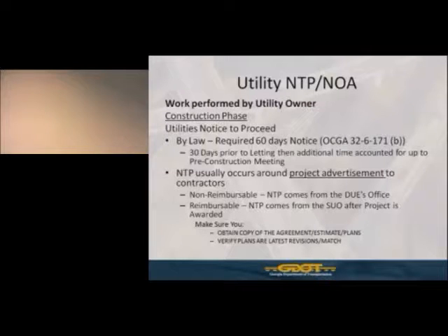One thing to keep in mind, I mentioned earlier about getting the final plans and all, and make sure you review those against your schedule plans. But also, if you have a reimbursable agreement, when you receive your copy of that agreement and the estimate and plans that were used to enter into that agreement, compare them against the final plans and ensure that there have not been any changes that may impact your reimbursable facilities. If there are any changes that may impact that, please contact the district utility office immediately and make them aware of that. Because depending on the situation, we can easily modify that estimate and therefore that agreement to account for any changes that needed to occur, but we need to do that as quickly as possible.